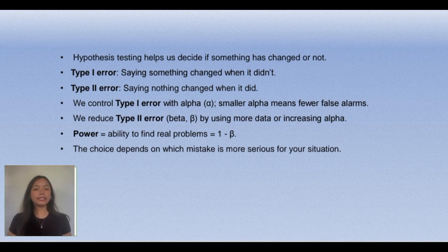Critical Path Method is a project planning technique that identifies the longest sequence of dependent tasks. This is called the critical path, and it gives the shortest time possible to complete the project. If any task in this path is delayed, the whole project is delayed. CPM works best for projects with well-defined tasks and timelines.